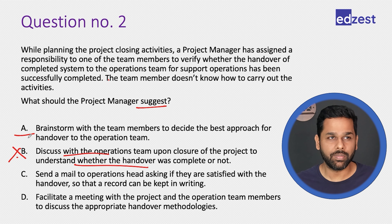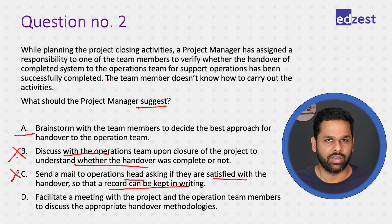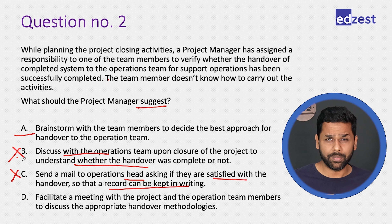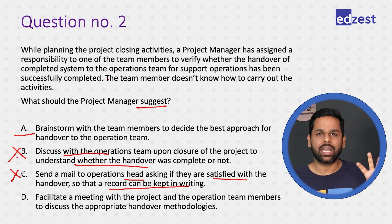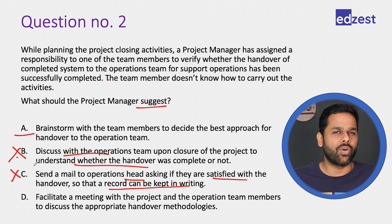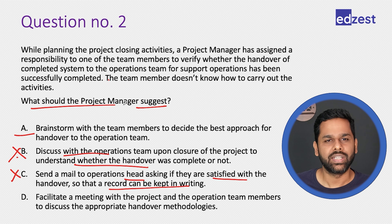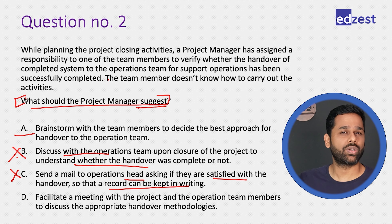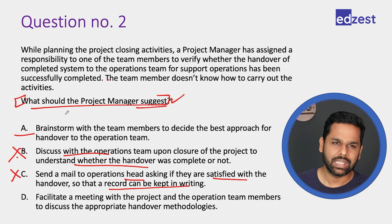Option A is where we are doing participatory decision making, a collective decision making — it is always better. Option C: send a mail to the operations head asking if they are satisfied with the handover so a record can be kept in writing. Again, the project manager is suggesting a direct solution. We do not know whether this is the best solution. Any option that says we will analyze, discuss, and then decide is typically better when there is a general question.